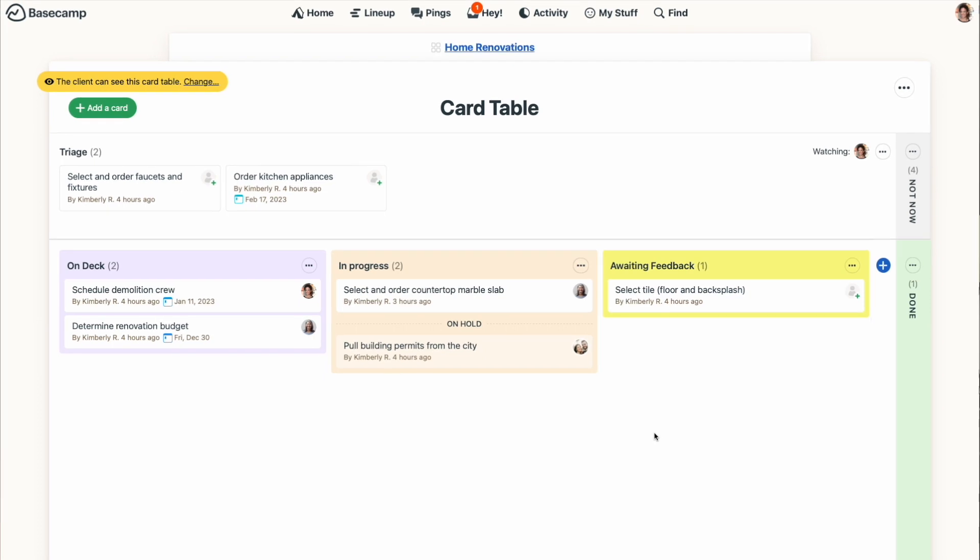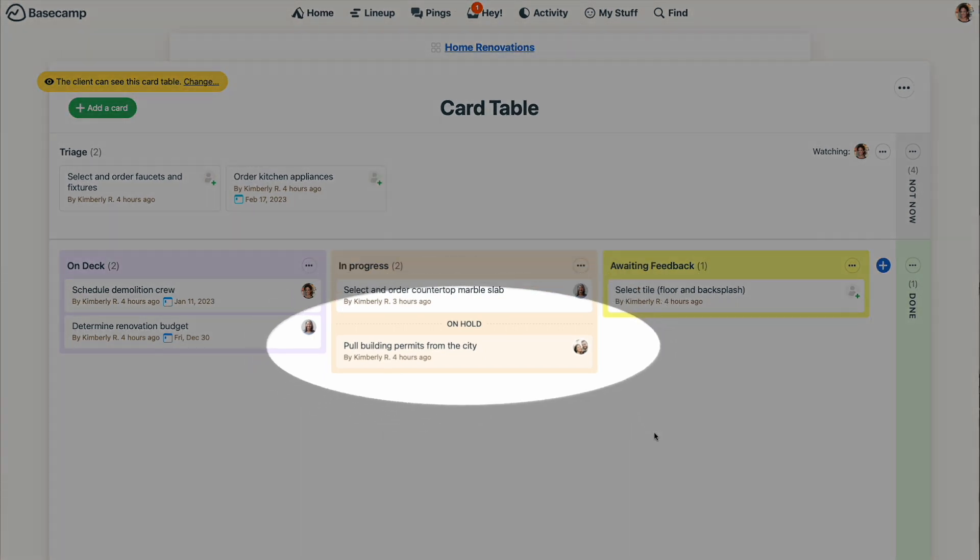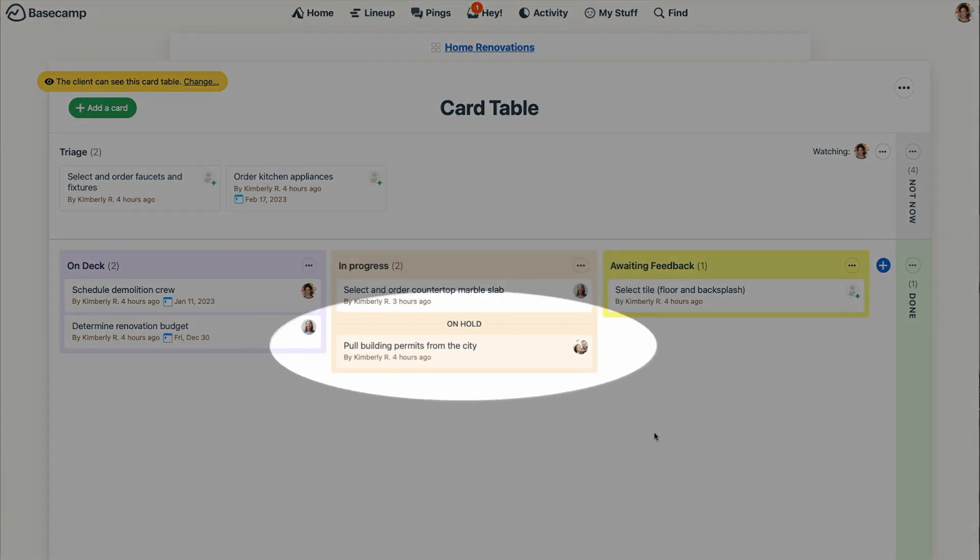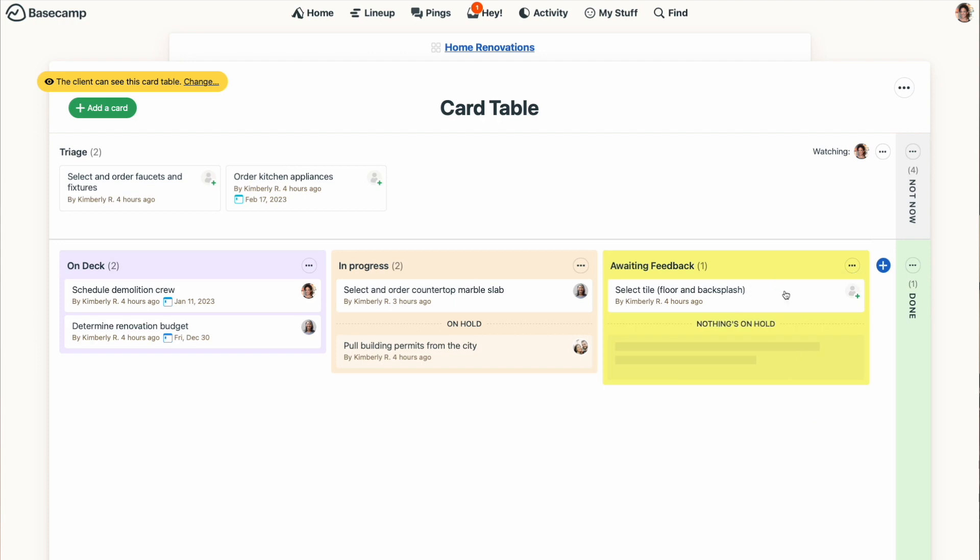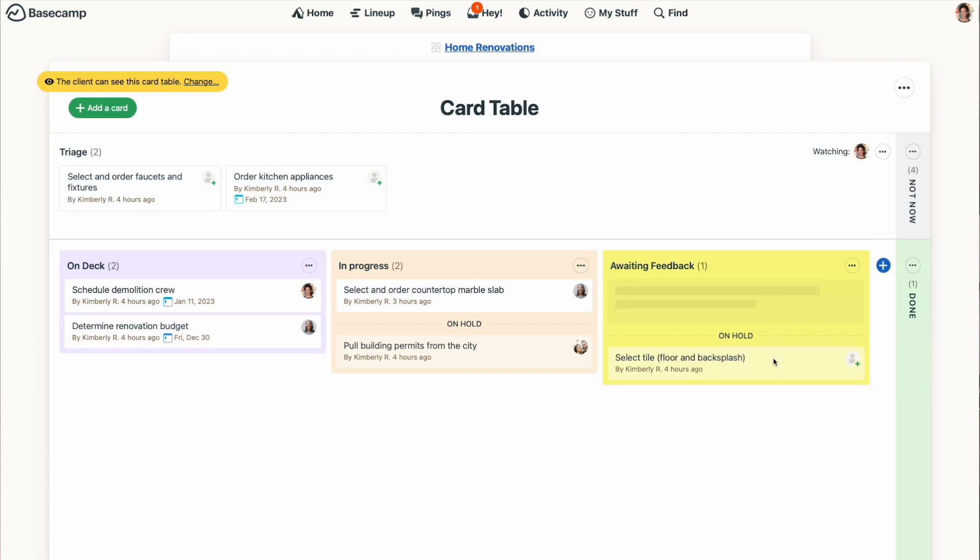Another feature of the card table I want to point out is On Hold. The On Hold area is really helpful when you can't take action on a card, but it still needs to stay in its current column. To turn On Hold on, just click the three-dot button at the top of the column and select Enable On Hold. This adds a section at the bottom of the column for any cards that are temporarily paused.